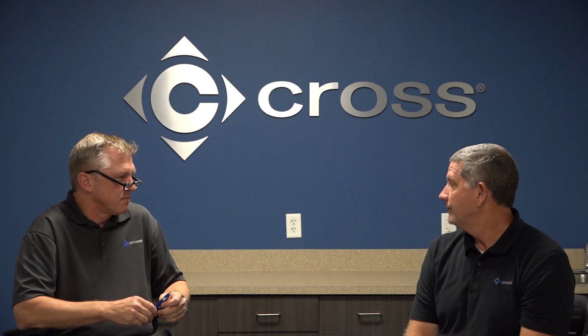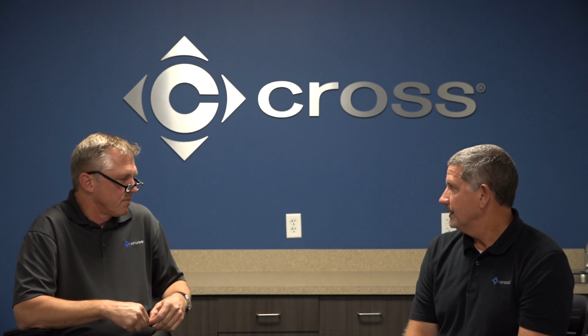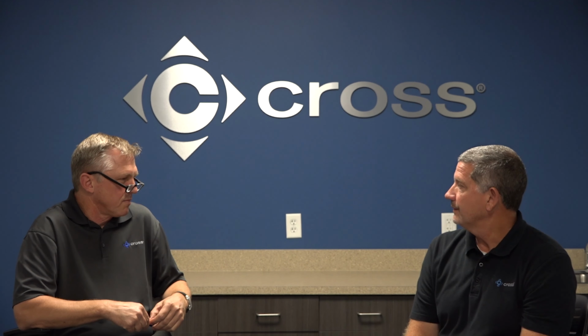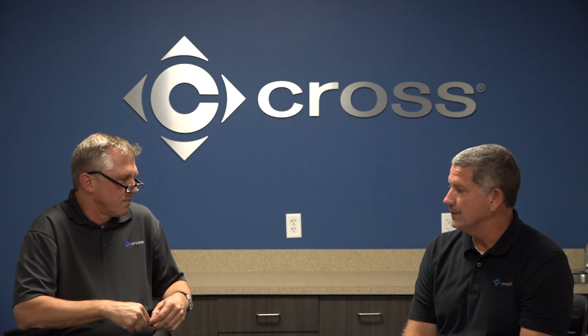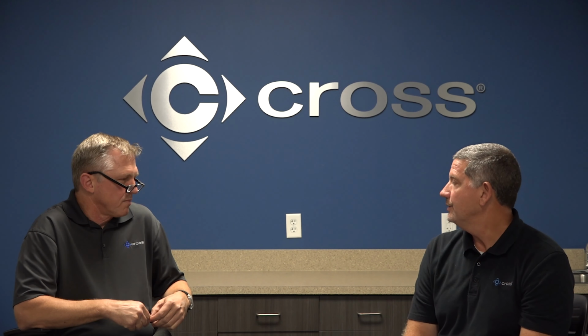Well, we will meet. Basically, we meet with the site and review our findings with them. We'll let them look and see if they have any questions about what we've documented for them. A lot of the documents we provide are basically a list of the devices where they had no information, so they can have that information if they're ever audited by the state, and show that they have it. Then we'll review that list and set a priority list of how we're going to address the action items. Just because a device may be obsolete isn't an indication that it needs to be replaced. But if it's obsolete and it were to fail, we need to make sure we have parts. Or if you get a spare, you can send the device to us and see if we can repair it, and that way you can have a spare.